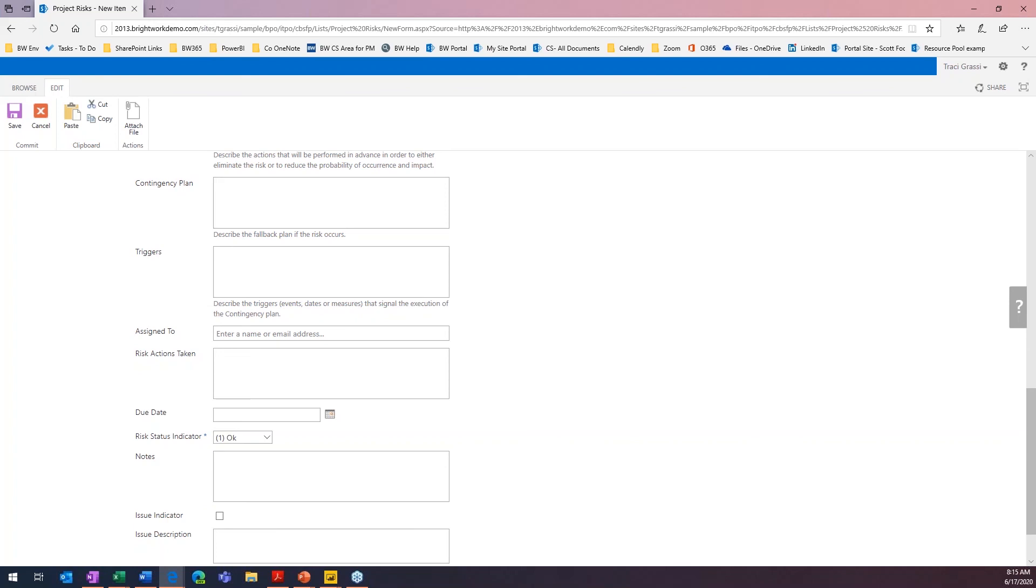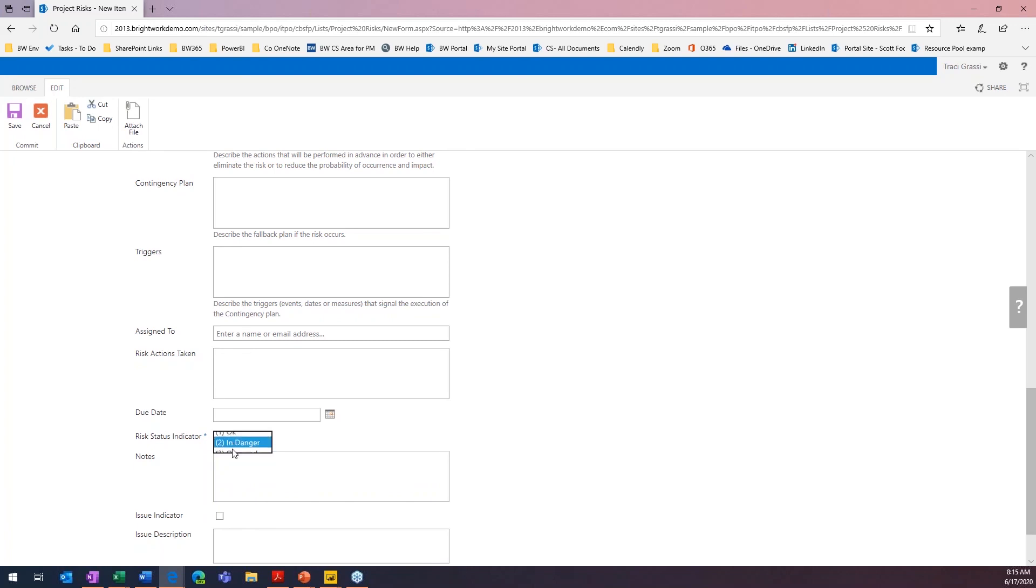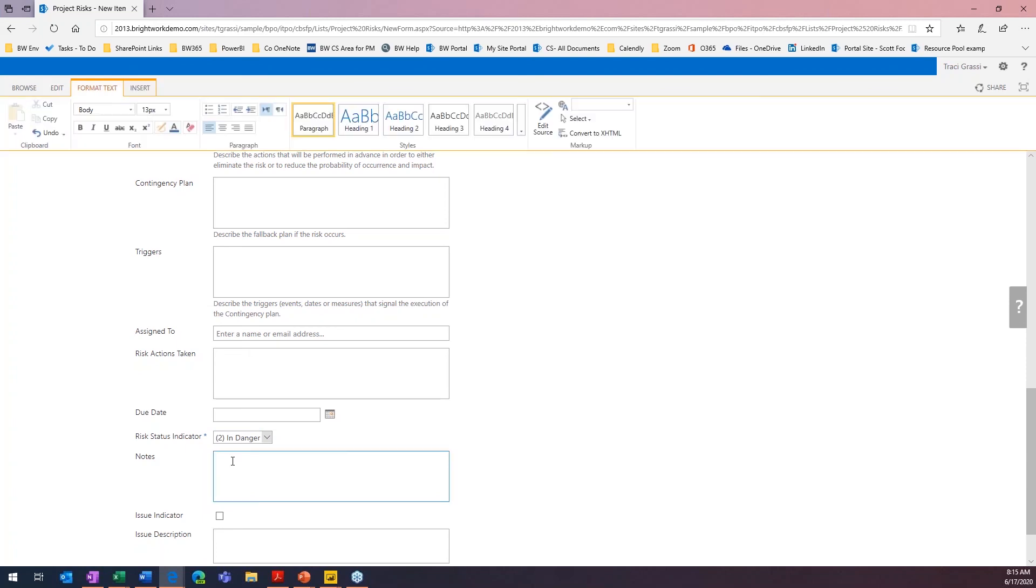We can also track our risk status. So, if we're okay, if we're in danger of this happening, or it actually did occur. So, I'm going to go ahead and just mark this one in danger. Here, you can just put a free form notes field. So, any other notes that you need to put in about this risk, you can go ahead and put them in here.